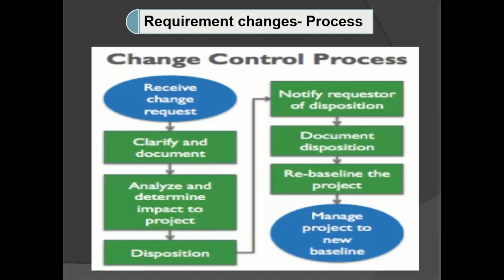So if the project manager says that no, this is the best price which we can give, then the client will think, is this change necessary at this point of time? In case he feels that it is mandatory, then he will carry on. In case he feels that it is not mandatory, then he will say, okay, we are dropping this change request, we will check later. So in case he feels it's mandatory, then he will say, okay, we are accepting the price, go with the further process. Then we will ask the client to make an upfront payment. So in a change request, the entire amount will be taken upfront. Then only we will start doing the change request.